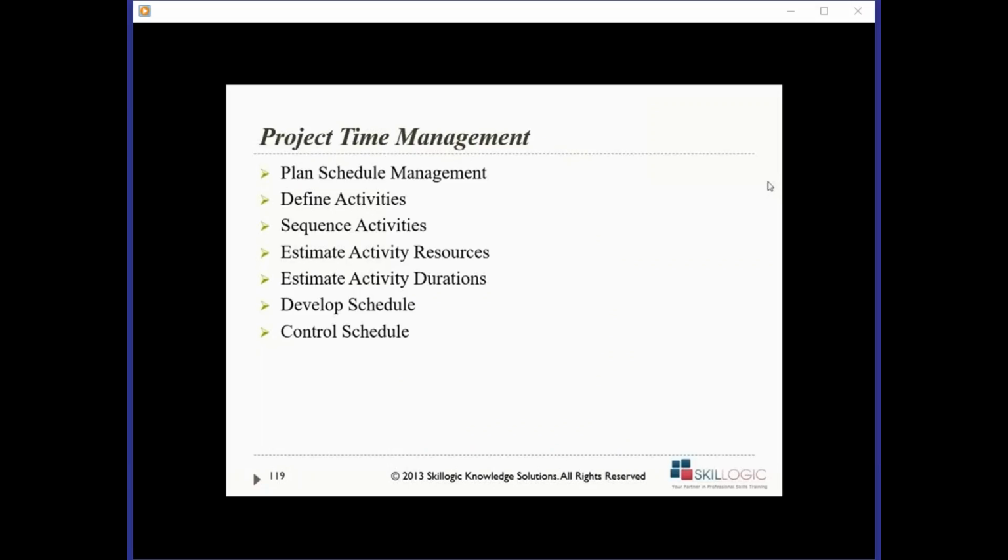So the change management procedure is very simple. If there is a change desired, either by you, your team members, your client, or your project board, any of the stakeholders, the change is logged. The change is logged into whatever portal or procedure that you have defined. Then the change is evaluated by you for the impact of the change in terms of time, cost, and risk.